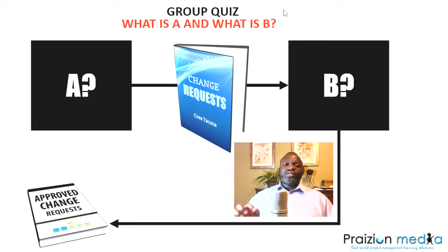The best way to attack change requests is to think about them as each knowledge area is concerned, not process by process. You'll find it tough that way. The best way is to think about them knowledge area by knowledge area. So you could think about develop project charter. Do you get a change request from there? Develop project management plan, do you get one from there? No, they are from direct and manage project work and monitor and control project work within integration.